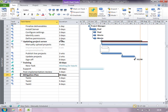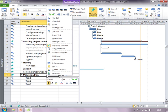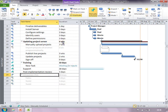Very simple, very effective and very useful for project managers. It's important for you to notice here the moment I activate or inactivate a summary task, all the subtasks follow the behavior.